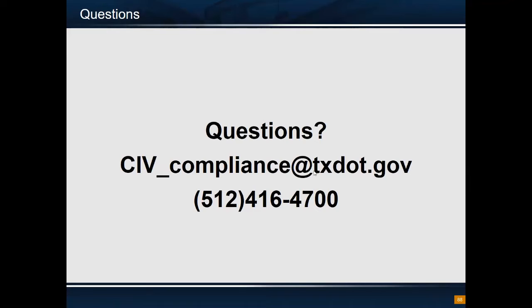Are forms required during the maintenance period? The DBE goal in most cases is set on either professional or construction activity, so DBE monitoring and monthly progress report forms should be submitted during those phases. We don't know of any LG projects with a goal assigned to the maintenance period. There may be a very rare case where goals are assigned to maintenance on a design-build project, but that's extremely rare. Go back to where the goal is assigned — was it assigned to the professional or construction stage? That's what the forms pertain to.